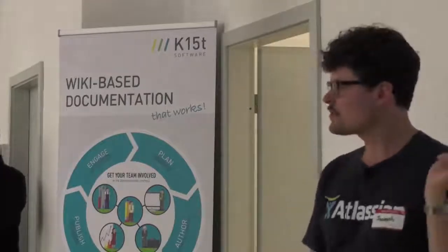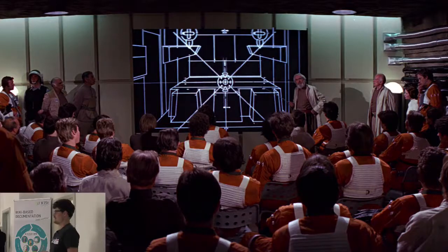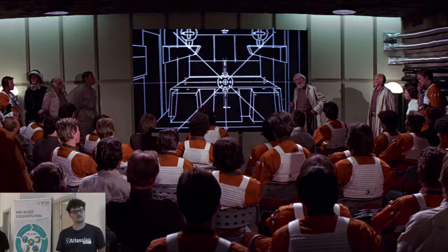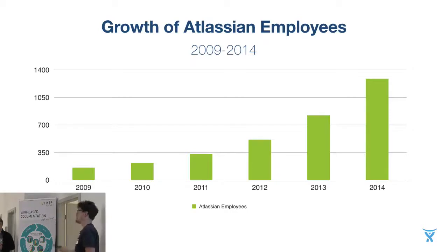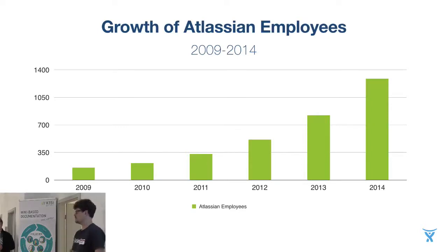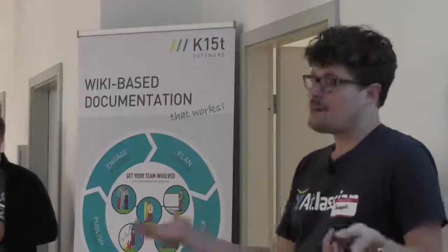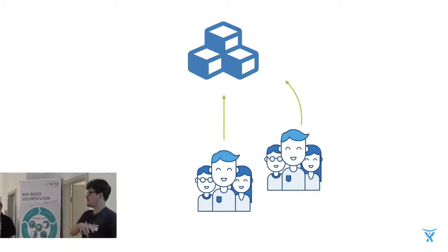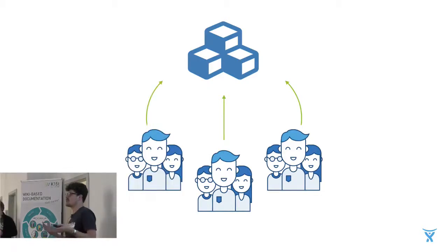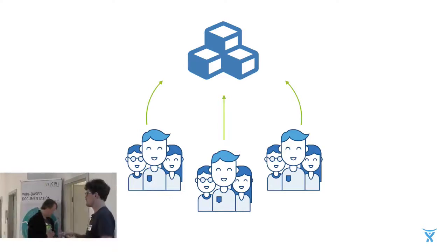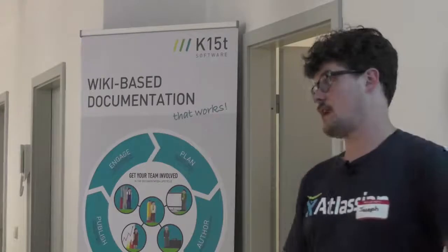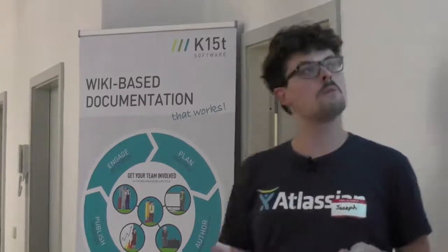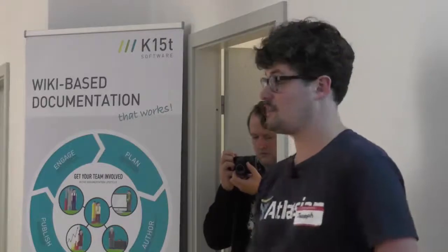This is something we felt at Atlassian because we've grown so fast. When I started in the company in 2009, we had about 200 people and now over 1,000 across the world. So it's five times as many people in five years, but we don't have five times as many products. We've got like maybe double the amount of products as we did five years ago. So that's five times as many people working on pretty much the same amount of stuff. And I'm sure you can appreciate in software engineering, it's kind of a well accepted rule that as you add more people working on the same projects, things start to slow down. There's bottlenecks and people are trying to access the same things. And the biggest one is release time. If you've got a big giant product, it's like a monolith for code and you're trying to release it. The more people you have, the harder that's going to be, the worse it's going to get and the longer your features will take to be shipped.